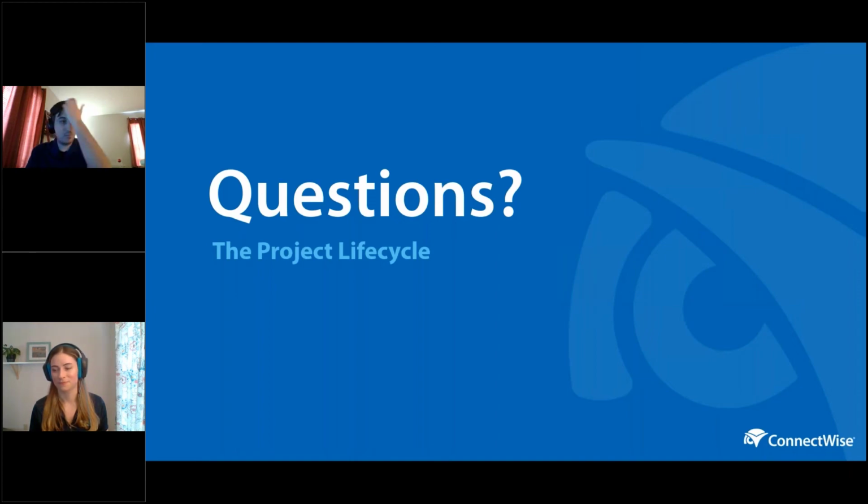I think this question comes from a lack of understanding of sales orders that I hear from a lot of partners, and that is, when should I be using sales orders? The answer is it depends on what your needs are. Sales orders allow you to do a couple different things. The most common reason I see sales orders used in regards to projects is when there is physical hardware involved in the project that needs to be purchased and likely invoiced before work begins.